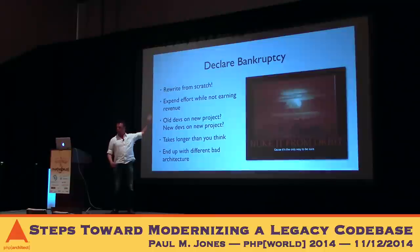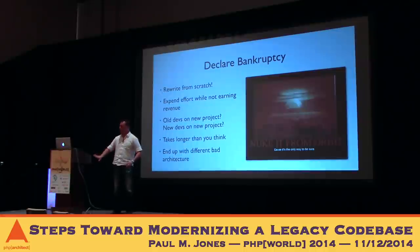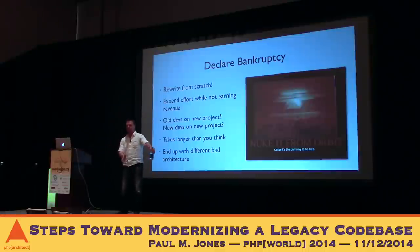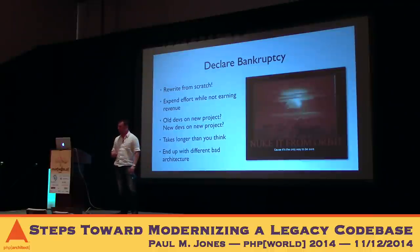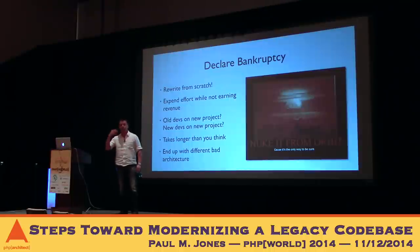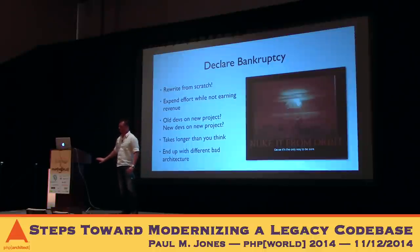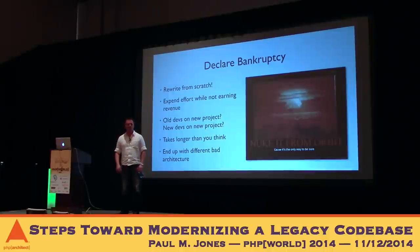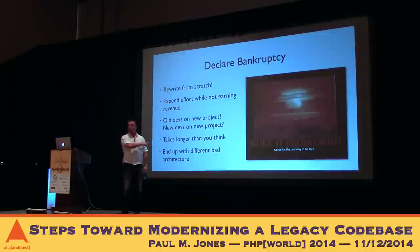One thing that makes people think they can get away with this anyway is: 'We'll hire extra developers, put them on the new rewrite, and leave the old developers on the existing project.' Here's the problem — we're back to the Mythical Man Month. The problem is one of communication and knowledge. When you hire new developers, they know zero about your business, nothing about the bugs in the old system or how the features are supposed to work. So they take up all the time of the old developers asking questions. The old developers' productivity drops to zero, and the new developers never had any productivity anyway. By doubling your workforce, you have now halved your productivity. That's the best case scenario.